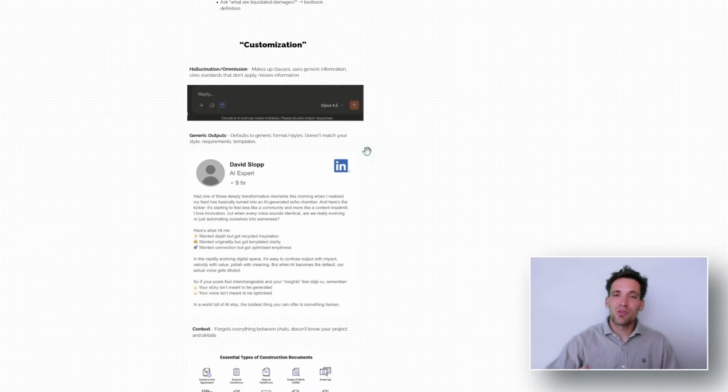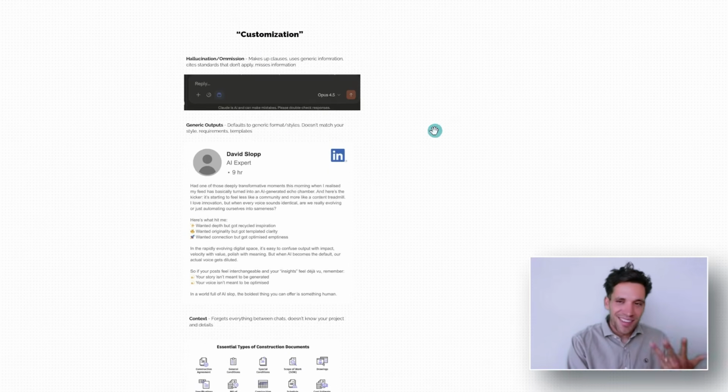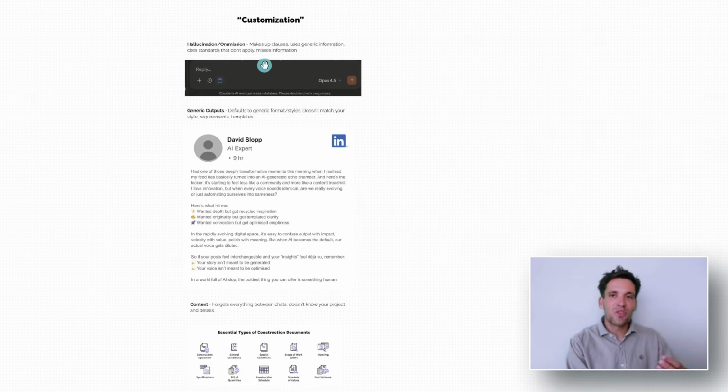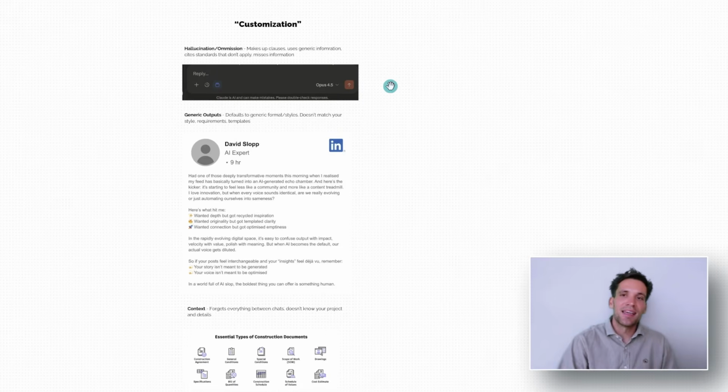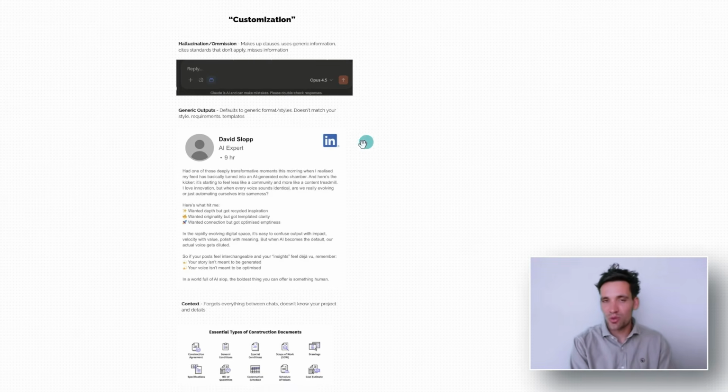Or it is a problem. There's a lot of evidence that shows this when you have an agentic workflow with a very long horizon task, you can get these cascading errors that build into it. But again, there's not a ton of applications to this in construction. The problem that I see more commonly is it tends to omit information. If you ask it to prepare a work breakdown structure for a typical concrete construction project, it is relatively likely to miss something. You want it to write a scope of works for concrete works, there's quite a high chance that it misses a specific requirement in there.